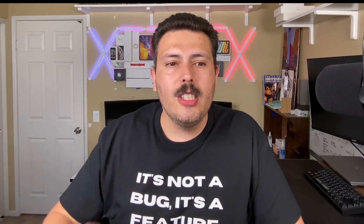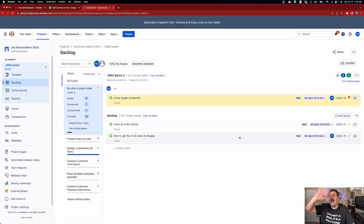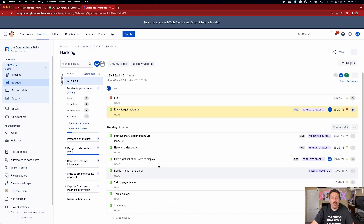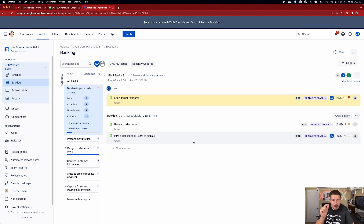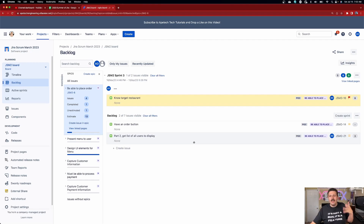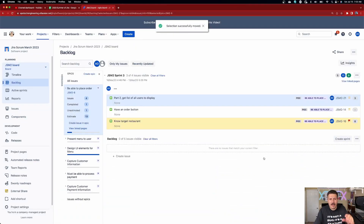The epics are just so big in scope that they're there as a reference point — not the actual work to be delivered, but rather the children of it. When I click on this epic, it will filter the backlog. You can see: one of two visible, 207 visible. It hides everything else that's not related to that epic, giving you a focused view of those concise, specific small stories that you're going to focus on for the sprint. You can then drag all the stories related to that epic into the sprint for a more focused, efficient sprint.